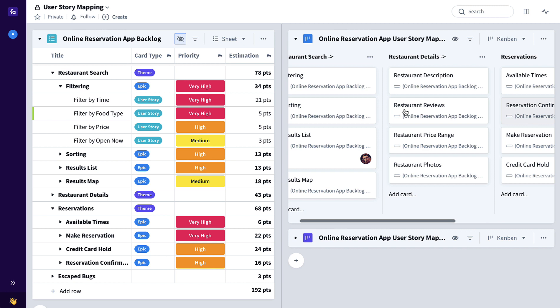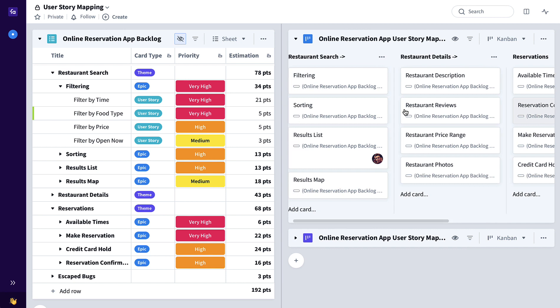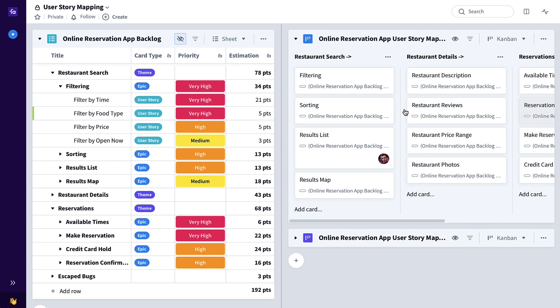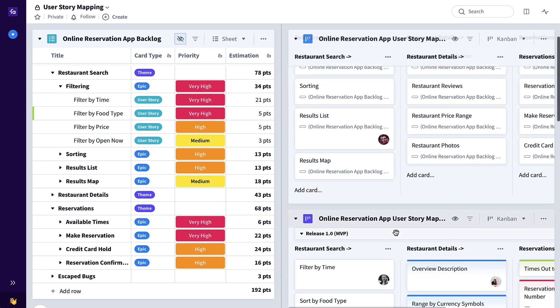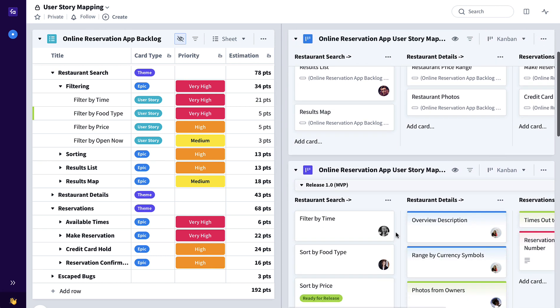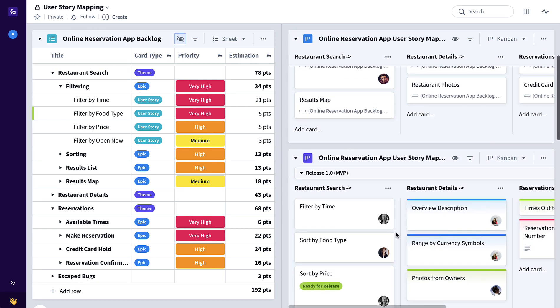Now we have some context as to how at the epic level customers are going to be using our product. This further breaks down in a second pass user story map to what eventually will become your release plan.